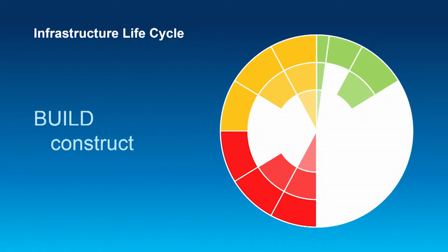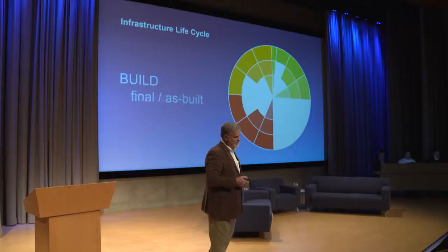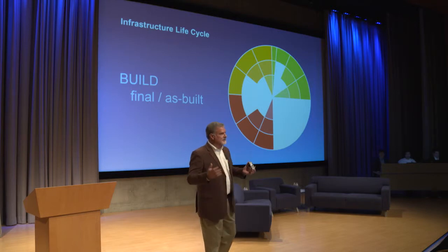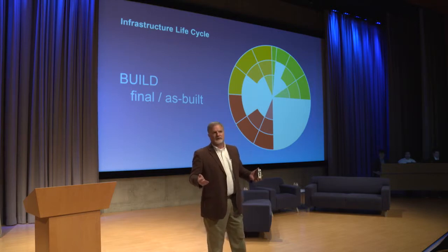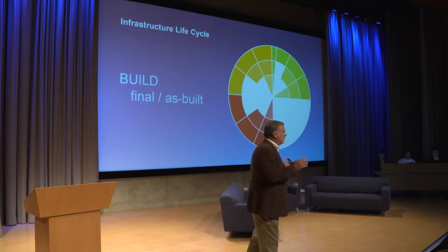But then as they go into the construction process, they too are adding their own pieces of information, right? They're starting to get various pieces of information, their field notes, they've maybe had to do some change orders because of in situ conditions, didn't realize there was this large granitic body in the way, those sorts of things. So they make changes, and they're starting to add data to that. Then as we get to that final as-built state, they now too have a wealth of information. And with this information, they may also have all those design drawings that they got from the design firm, may or may not have used, they just conceptually use them, but they have this entire package, this deliverable, at this as-built stage. And for those of us in the asset management world, this is kind of T equals 0, right? That's when these assets are ready to go.